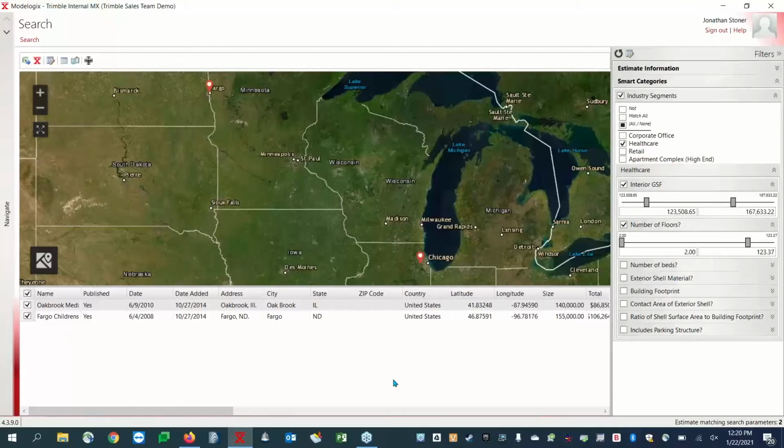The idea is the more projects you use, the more accurate your pricing is going to be. But what we typically see is that folks use 2 to 3 projects on average to then come up with their conceptual estimate. That's what we see. But I get questions all the time about, well, what if I wanted to use 7 projects? By all means, go ahead. It's just more data that you have to review. So when we get in here and we're looking at the numbers, you're going to see that even with just 2 projects, it's still quite a few numbers to look at. Not as many as if we were building a full-blown estimate, but it's still a lot of data to review.